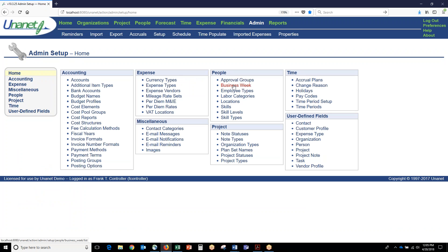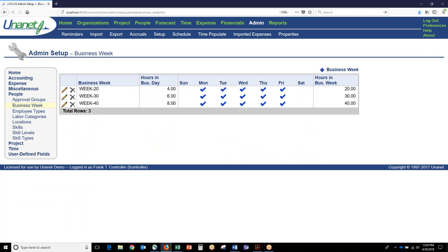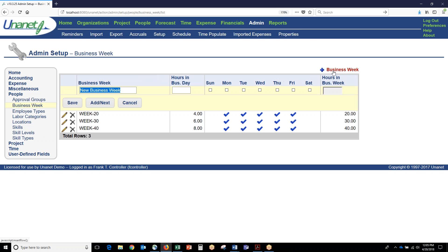A few other background items on the people side of the matrix: you define a business week. The business week is how UNINET determines someone's capacity for a future time frame. You can have as many different business weeks as you want and then people can belong to different business weeks.